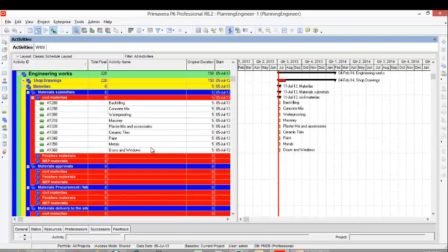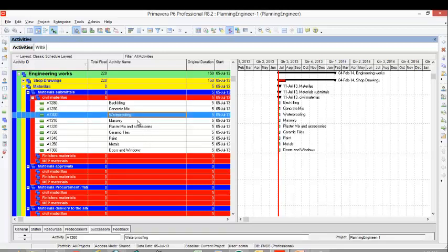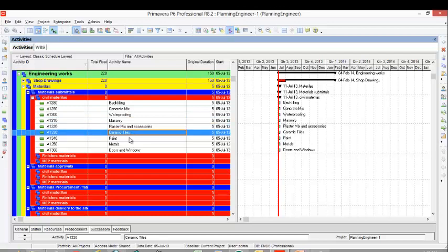I will stop up to here and let you continue the remaining materials. I'll just start now, tell you how to find the dates of these materials. Actually, myself, I have some technique in these materials, and I prefer to make it backward and then give it to the procurement department to confirm the dates.